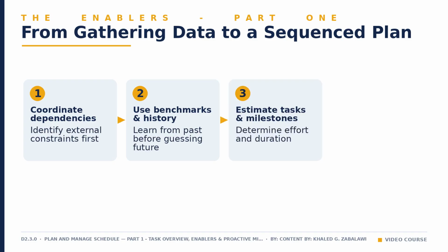Third, estimate project tasks and milestones. Determine how much effort or duration each piece of work truly requires. Predictive teams size this in hours or days. Adaptive teams size it in relative story points. Both get their own deep dive later in this lesson.